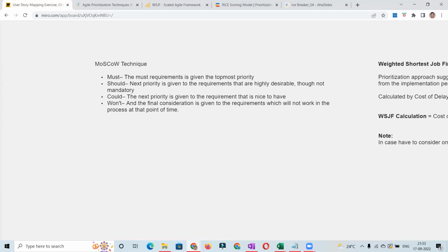Thank you. Kirti, one more option here is, if you really are having difficulty in breaking down a story, maybe change the perspective from which you're looking at the story. Sometimes people get stuck with the end user being the beneficiary in a story. But if you split it in terms of a developer or an integration manager, you can easily split the work down. So maybe change the user persona which you're using to create the story.